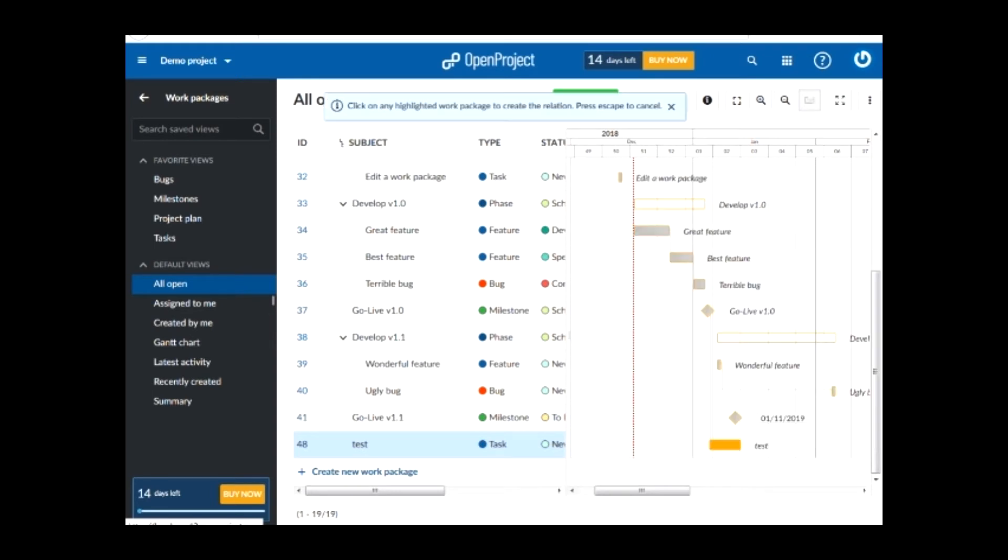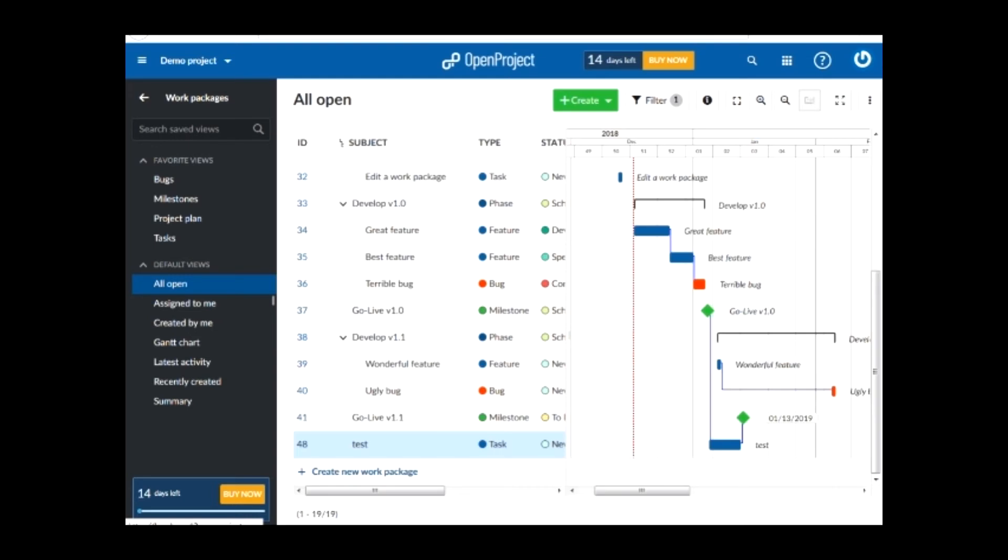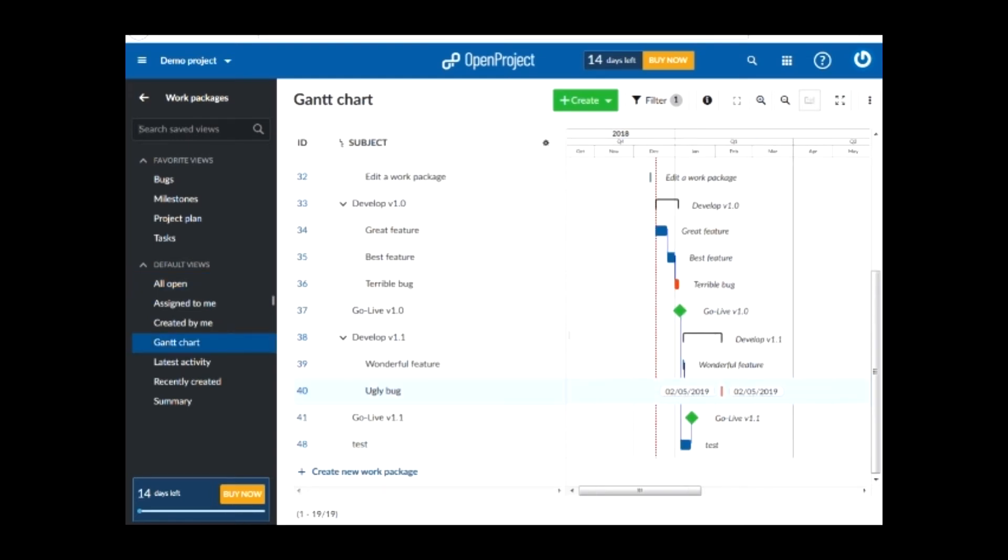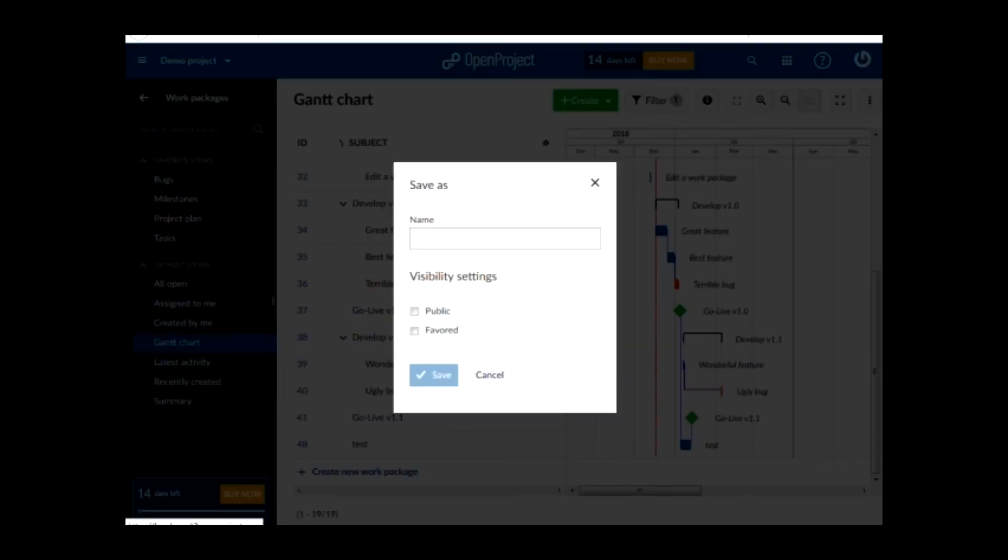As you see on the Gantt chart, the relationship is created and shown with the blue lines. After you finish editing the Gantt chart, you can click on the three dots on the right side of your screen and save the Gantt chart.